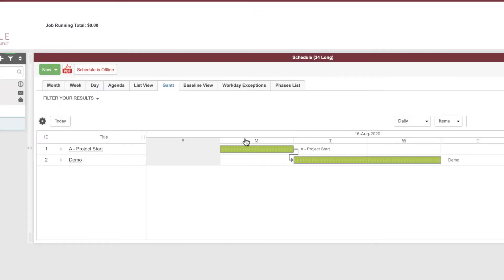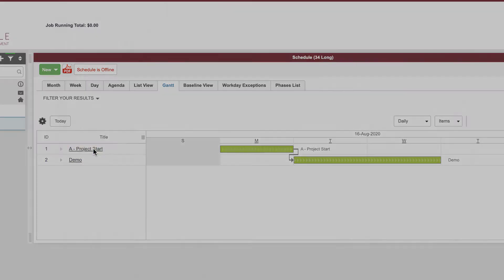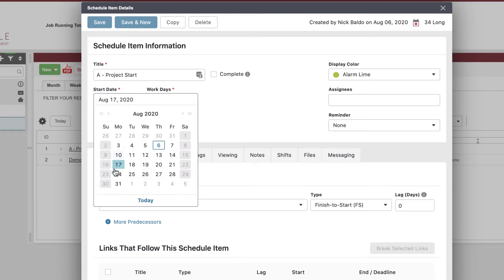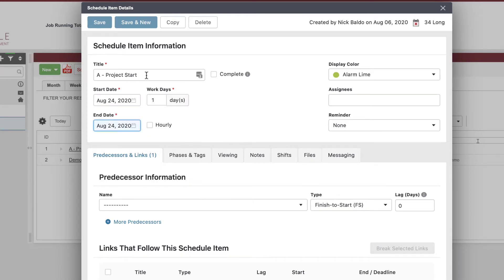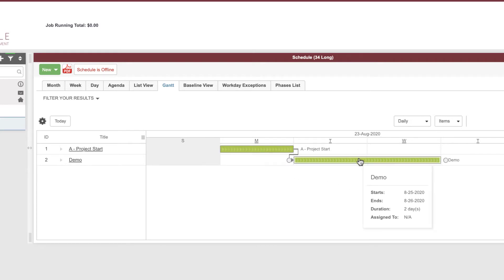Here's what is so great about predecessors — see this link created here? The project starts on this date and then I demo the next day. What I love about this and what is so important in this kind of scheduling is: the minute this start date pushes out — let's say we push it out a week — the rest of the schedule moves as well. If we did not build those links, the project start moves but nothing else moves. This is an essential part of any scheduling tool.